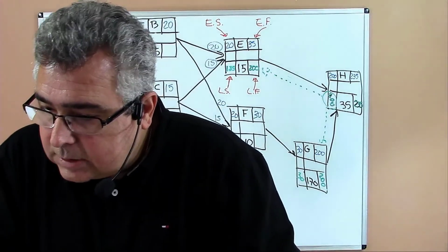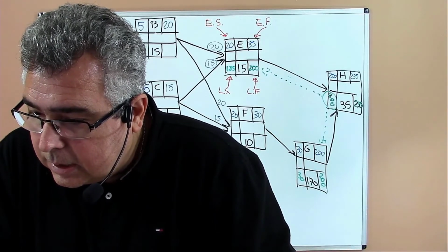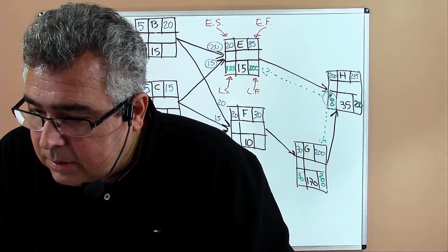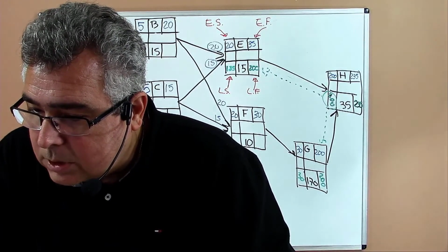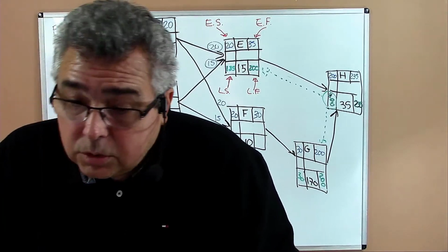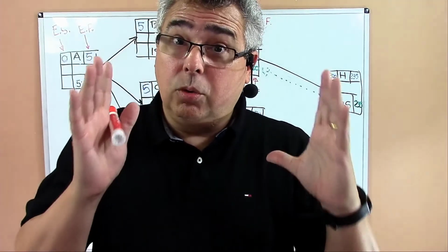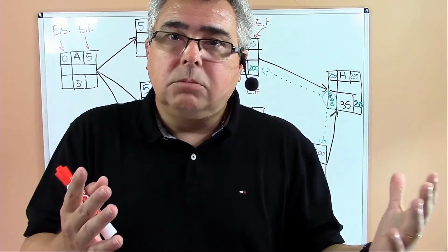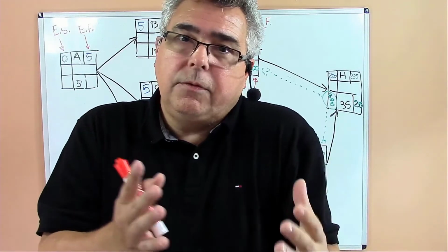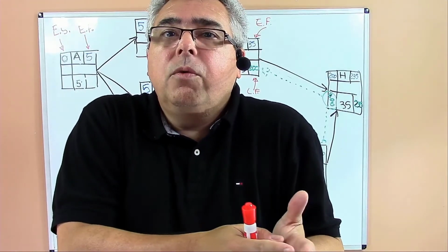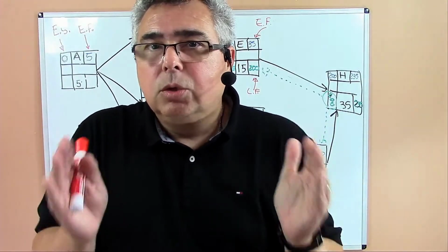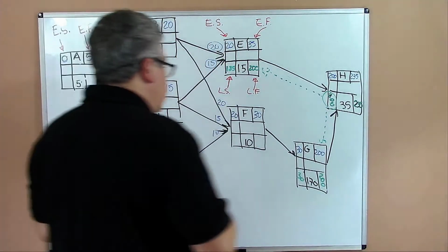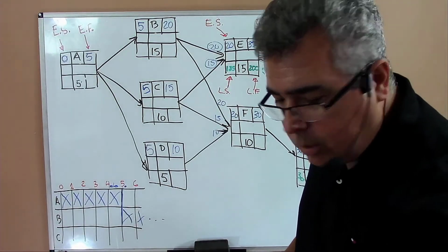Javaria said, so the late start finish isn't the estimated worst case scenario times? Late start and finish are not worst case scenario times. So the late start is just information, and you can play with that information, okay? It just gives you an idea if you must start on that day or if you have some flexibility to schedule the task. Okay, let's conclude the calculation here.